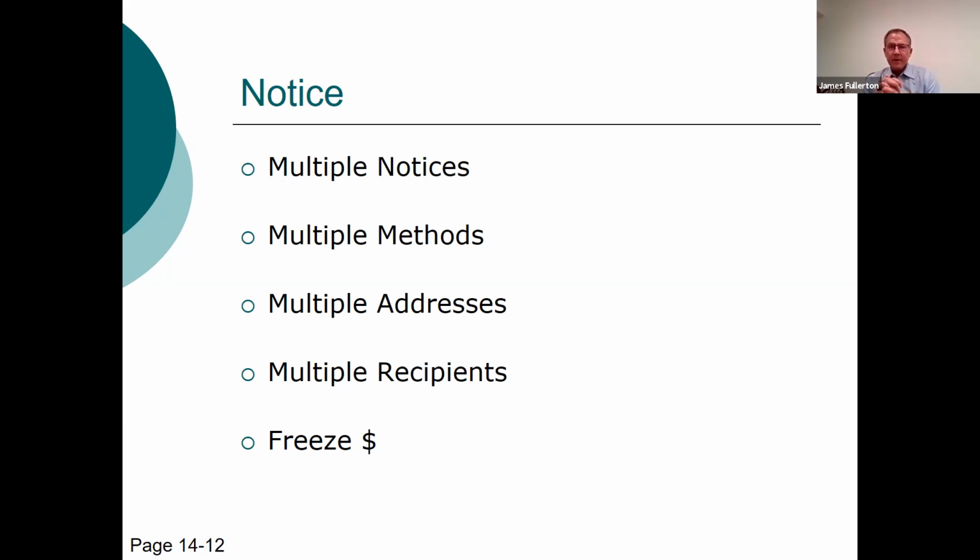The Federal Miller Act used to say it had to go certified mail. And so you had to make sure you send your notice 85 days after your last work, so that you could make sure it was received by certified mail within 90 days of your last work.